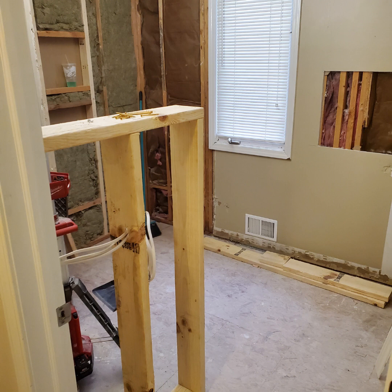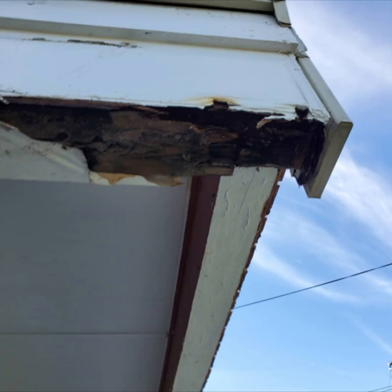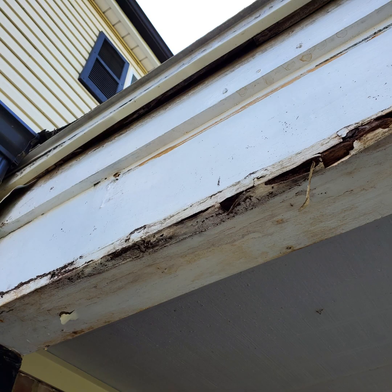And again, unknown costs. This was a regular wall that turned into a half wall. Always change orders too, with electrical run through it. You've got to be careful. Again, unknown conditions are the responsibility of the homeowner. This was a $900 post removal job that turned into about, I think, a $12,000 job for rebuilding their carport. So that's pretty much what it is.